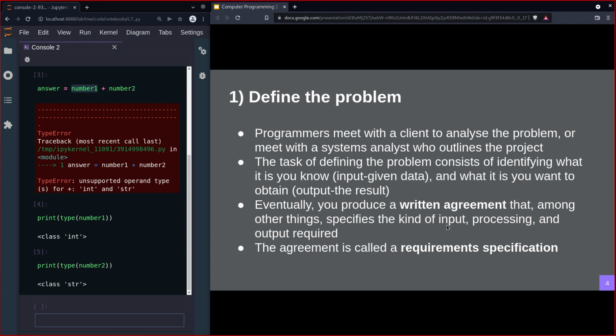So you go home, you make them a simple one-page website, and say, there's your website done, and they say, but would you be able to put a booking system on there so people can book appointments? And you'd say, well, that's not in the written agreement, that's well beyond the scope of what you asked me to do, and it's going to cost more money. We're going to need a database and some kind of calendar integration. That's a different project. So the requirement specification lists the functional and non-functional requirements, but also defines the scope of what you're going to do.